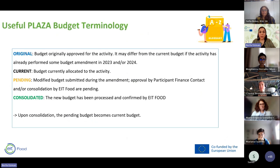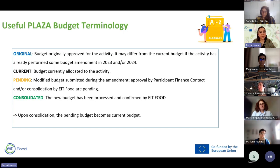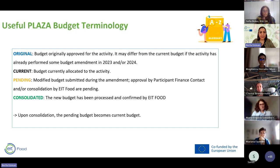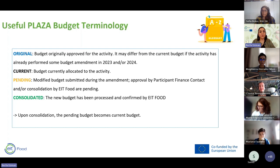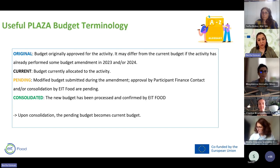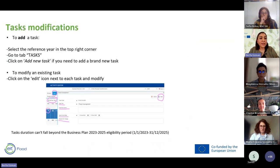Before working on budgets, here are the definitions of budget columns you will see in Activity Editor. The 'Original' column is the budget originally approved for the activity. The 'Current' budget is the budget currently allocated to the activity. 'Pending' is the modified budget submitted during this amendment, awaiting approval by finance contacts or consolidation by EIT Food. The 'Consolidated' column shows new budgets confirmed by EIT Food — upon consolidation, the pending budget becomes the current budget.